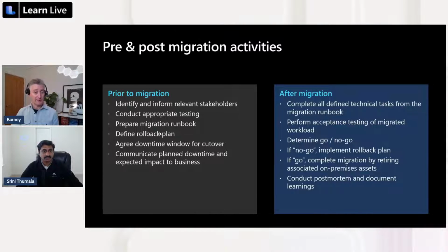And then at the point of migration, once the migration has happened, you've got that downtime window where you're doing the work. It's great if you've got, in that period of time, a defined set. You've got that runbook that you put together of what you need to do. You know the people who need to connect to the server and verify that it's all working. Not just that it boots and is accessible over RDP to administrators, but also that the application is behaving as it should. So having all those people available to do that testing, to verify that it's good,